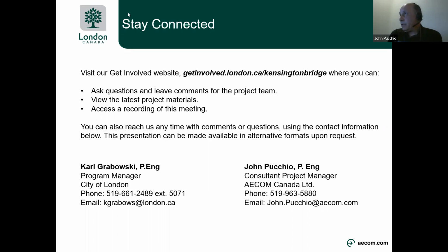I can provide initial comment, and maybe Carl or Jane, you can correct me if I'm wrong. In terms of timing of projects around the city, these are looked at by city staff. I would suggest that those particular projects named on Wharncliffe, Stanley, Horton Street would actually take place before any work is done on this project. This is an EA process. There is some preliminary design, but there's another process which would follow into detailed design. So we're years off doing anything with this structure. From that perspective, I would suggest that the work that was mentioned would actually be complete by the time this would be initiated.